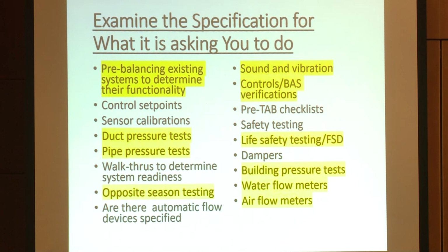And if you don't read it and you get a contract that says you need to do all this stuff and you did not account for it in your bid or in your proposal, you will have to do it for free. And TAB work is not cheap.